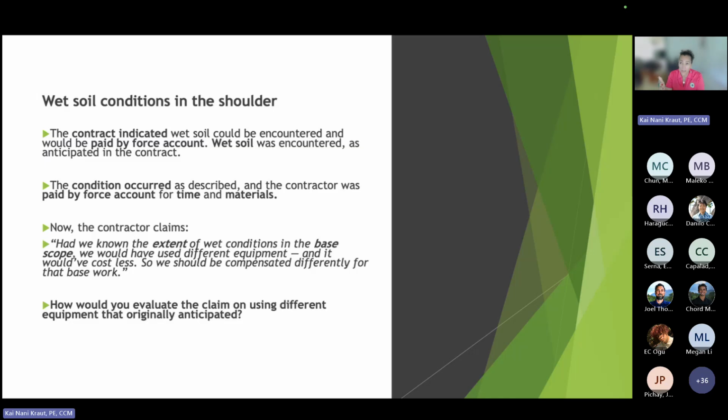So if we didn't do that, it might be materially different. I don't think accessing the area alone is going to say whether it's reasonable, because if you can see it, I think it's patent, and that it's not different, and they should have known.